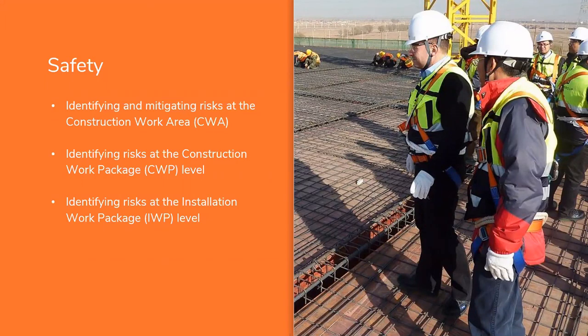That actually happened to 2 workers. They came back from the work being shut down for a while. They were instructed to remove some pumps, but nobody had identified for them this risk of the pumps overheating. When they did their post-incident event, they found that the IWPs that were originally created were never released because the work had been postponed. And they found that had they received those packages, they would have been aware of the risk and it would have been completely avoidable.